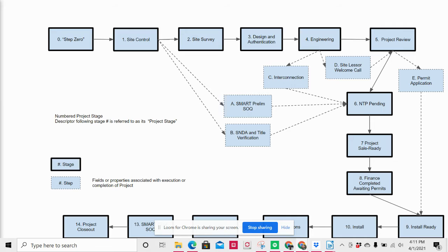In addition to that, they're going to look at the production. So if somebody thinks they might have some trees that are an issue, or may need some tree work done, the site surveyor is going to be boots on the ground and say, yep, this tree is in the way. We need this actually eliminated rather than just pruned or trimmed.